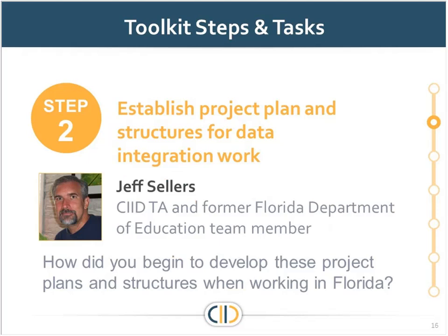I'll do it. And so with that, just like what Aaron said, the engagement of state leadership really will enable you to move forward with the project once you have their support. So within this step, looking at establishing that project plan and structures for data integration work, for us in Florida, the way we approached that was to put together a 3-member project management team. The first member was primarily focused on the specifics and the mechanics around project management.